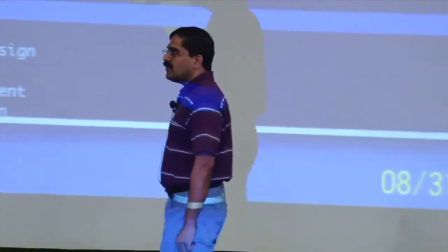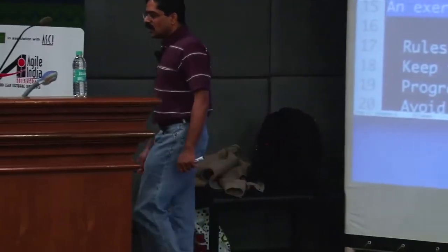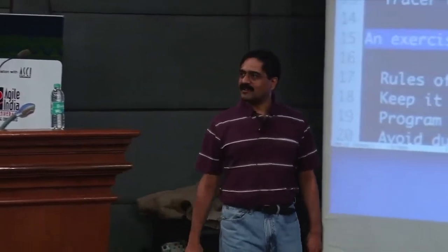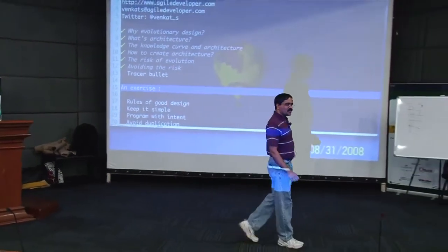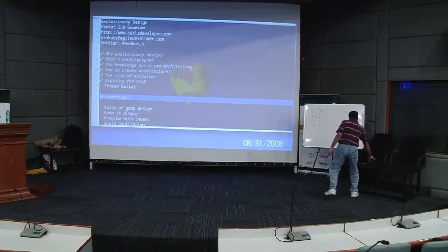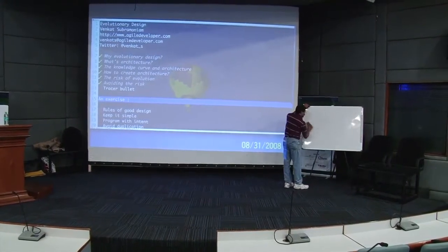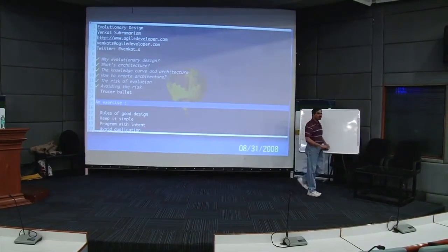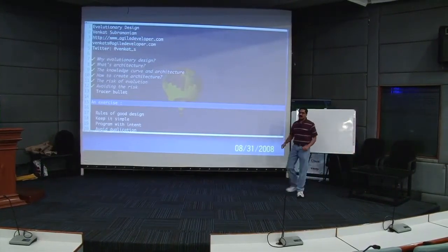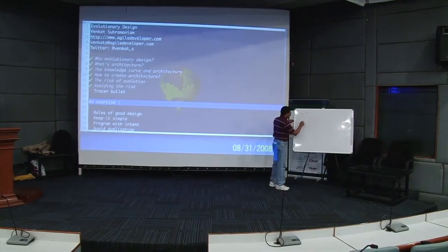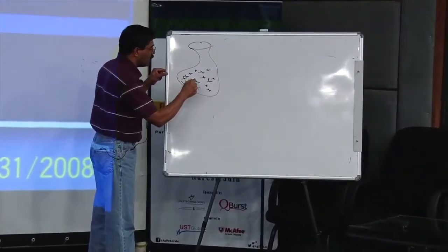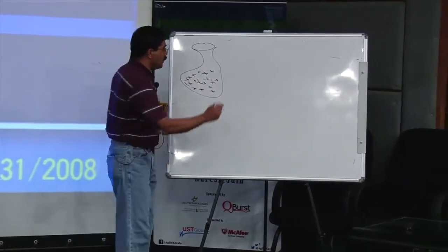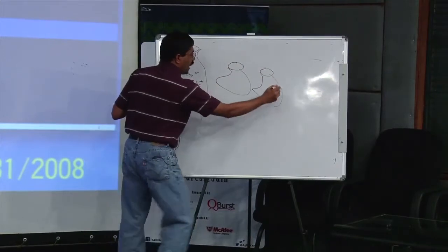So how do we prevent that from happening? Well, remember, you already answered the question before. You said, get your London ticket 3 months ahead. Why did you say that? Because you had a prediction of the cost. So when you look at Agile projects, you don't say, hey, my Agile project has stories, I'm going to just divide them into pieces and start working on it. That is nonsense. What you do is you say, here are all my stories on my project. There's a little pot, a knapsack, whatever you want to call it, and all my stories are in here. And I'm going to put them into smaller pots or knapsacks and divide them.